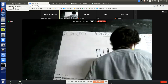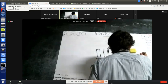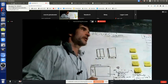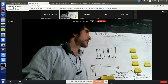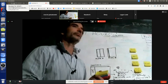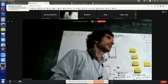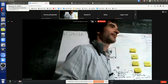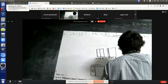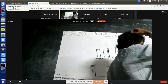Okay. Who wants to do the labeling part? What are the two kinds of spray paint? You have to take a look at the master diagram with all the part labels, basically 1 through 24 and particular letters, and put them on the panels so they're clearly visible. I'd like to work on that, but I'm not confident about my ability to figure it out correctly. If I need help, I'd be happy to ask. Really, there should be a labeler and at least two people to move the panels around, and maybe more people moving.